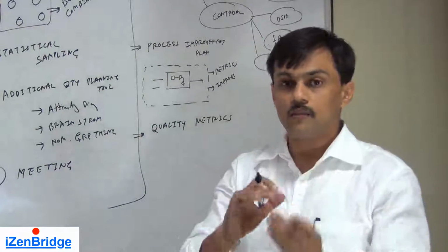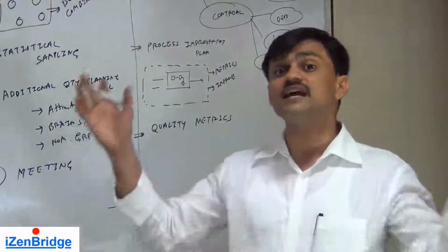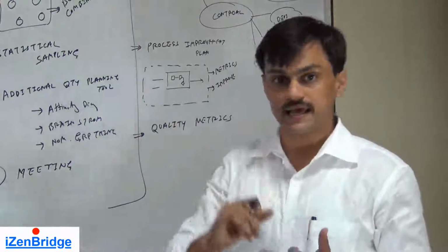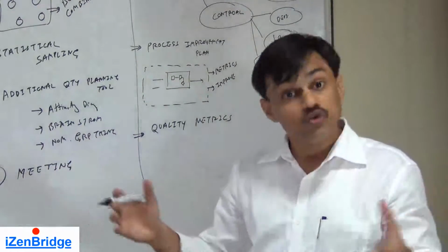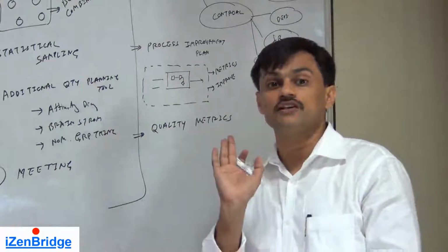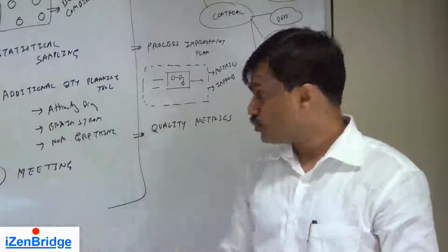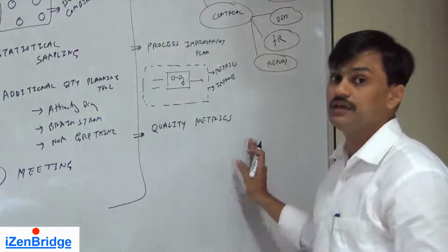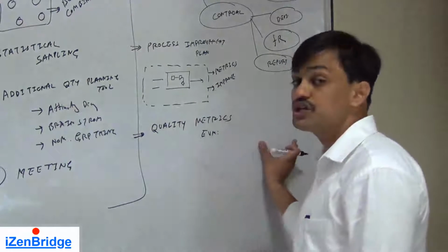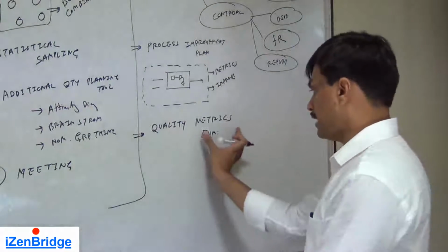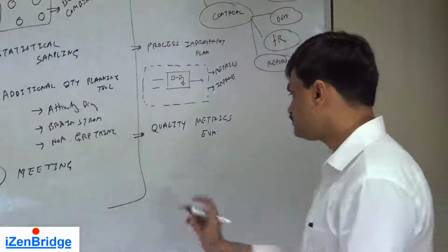There could be process metrics, which the process improvement plan talks about. There could be project level metrics like schedule performance index, cost performance index, and earned value management. We may also have business level metrics like return on investment and customer satisfaction, because we are doing acceptance in between. So we identify which quality metrics would be relevant for our project. We define, like for earned value management, what kind of thresholds they should adhere to, and these metrics will get measured while doing assurance and quality control.